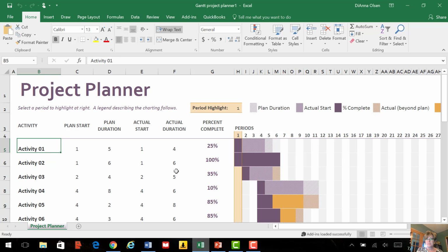Think about it as you will from step A to step Z, however many steps you have. And you're going to talk about what's the duration of each of those steps. And you begin to build over here what becomes your schedule from the very beginning start date to the very end. So you have a very good idea of exactly how many days you have for each step. You know exactly how long the project's going to take you. So when we talk about projects, this methodology, if applied, helps you come in on time, on budget, and with a higher quality project. This is the part that helps you come in on time, okay?